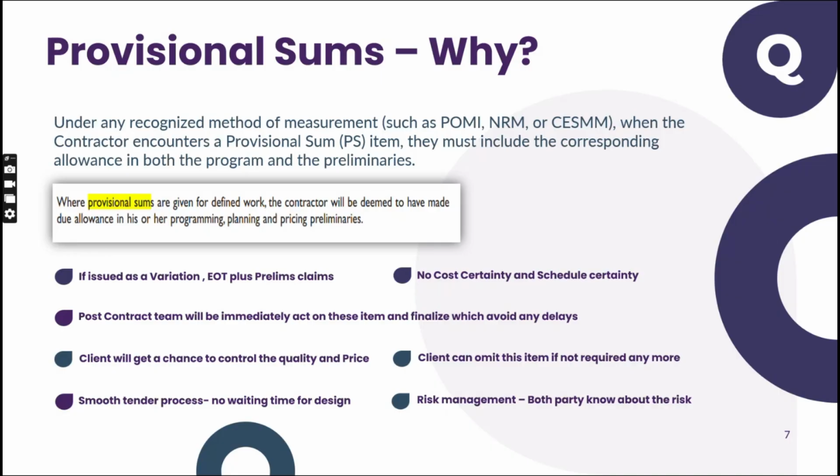Normally, if you are a cost consultant, you have to ask the contractor to submit his resource histogram, his engineering staff histogram, his planned equipment histogram, everything. Because you want to see what is considered: how many infra engineers, how many landscape engineers, how many civil engineers. In the worst case, when you are omitting the landscape, you can tell him, as per your histogram, there is a landscape engineer, take him out. As per your histogram, there is an infra engineer, take him out.